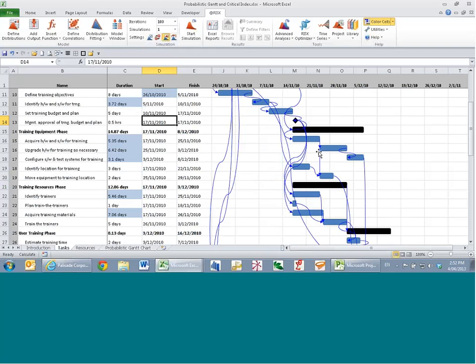So instead of saying something is critical or not, we might now draw a new line in the sand at maybe 70%. If a task has a critical index of at least 70%, then we will deem it to be important, or maybe 50%. But something around 70 might be a good start. That's certainly the default value in the software for indicating importance, but you can change that. So it's a brand new step, and it's one of the new pieces of communication you may need to give to your project managers or to your board of directors, management, your clients, that we just don't have a critical path anymore.